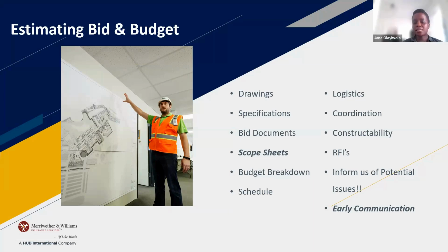Okay, I see your point. Yeah, that is excellent. You definitely do want to break it out. But it's also going to be highly subjective on the instructions that you were provided in the bid documents by the GCs during the bidding process. But you definitely want to call it out. You want to include it in your notes and clarifications. You want to qualify it, and depending on whether they want you to put it in the base bid, you can do that, right? And make that sum up to your total cost. Or alternatively, you can just have it as an alternate, right?